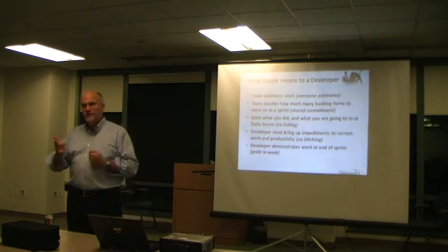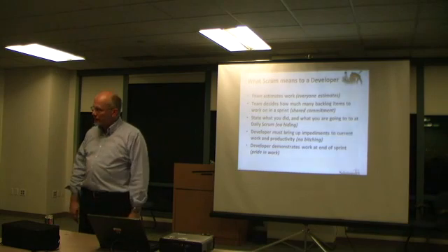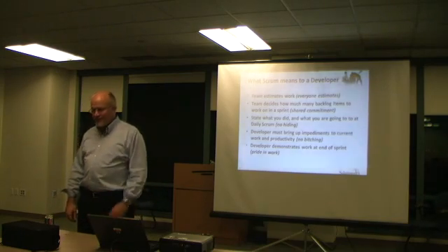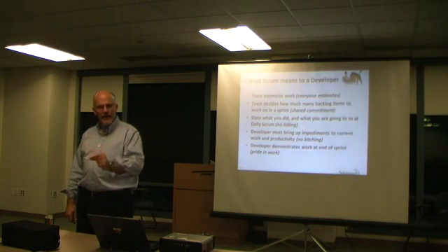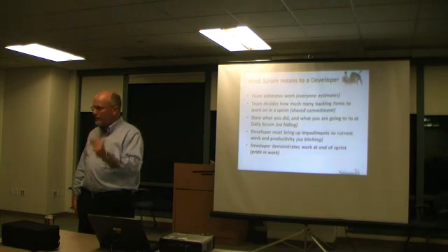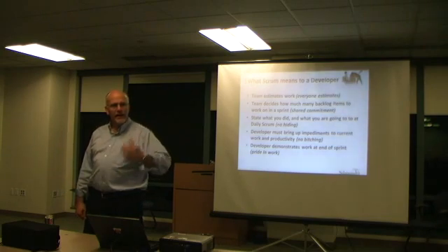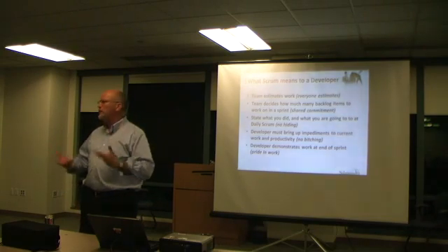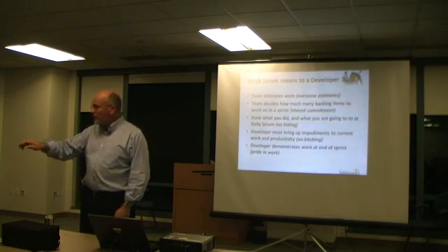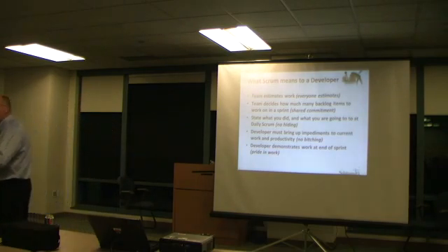The analogy I use is for analysts working on a document of some kind. They say, well, I worked on the document yesterday and I went to some meetings. And they do that for two weeks. Versus saying, I got chapter 1 done, I did the outline for chapter 2, and tomorrow I'm going to finish that and work on the issues I found in chapter 1 and refactor it. There's something innately human that reinforces your spirit to say, I got something done yesterday. So I'm not dismissing that it's hard to split stories, but it's usually helpful to do so.